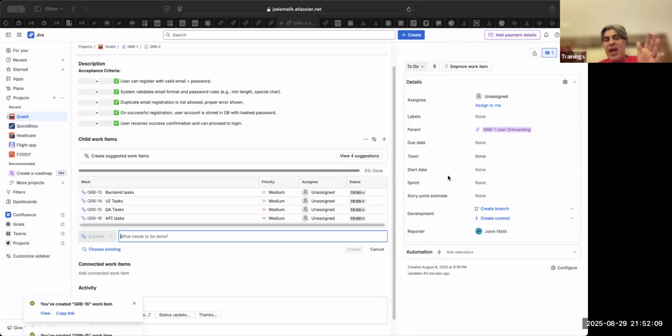So how do you play planning poker? In planning poker, the PO introduces the story and acceptance criteria, and the team does the tasking. After that, the Scrum Master says, let's do an estimation. You could use basic Teams chat, or Miro. There are multiple tools in the market that allow you to flip a card. Those cards will have 1, 2, 3, 5, 8, 13, 20, those kinds of estimation scale. People will do a first round of estimation. Then people who are outliers will be asked to explain their position.